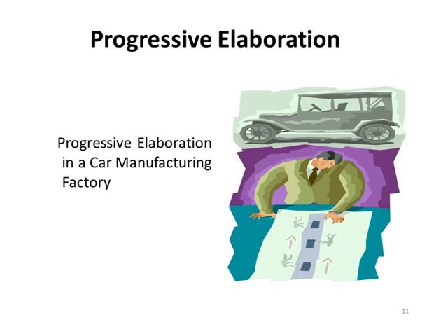As the project work continues, new information starts pouring in, and the project team makes necessary changes in the project plan. This is called progressive elaboration. In the case of manufacturing a car, an idea evolves, which gets refined with discussion. A blueprint is prepared. A prototype is manufactured. The blueprints are changed on the feedback of the prototype, and a revised blueprint is prepared. Then during manufacturing, some limitations come to light. The blueprints are again refined.